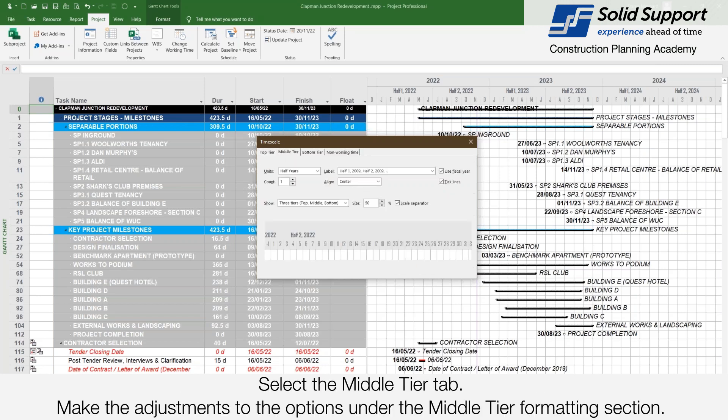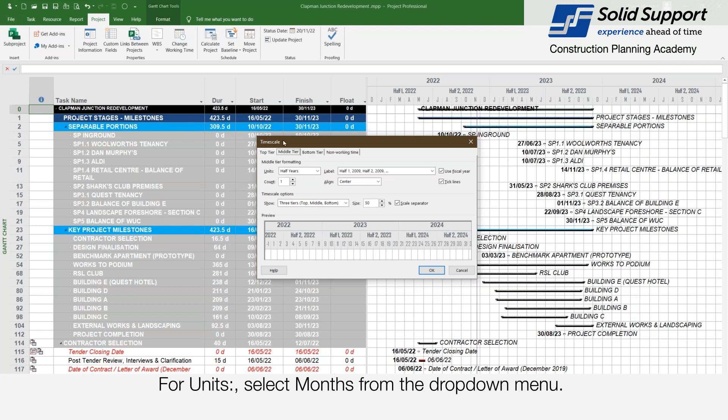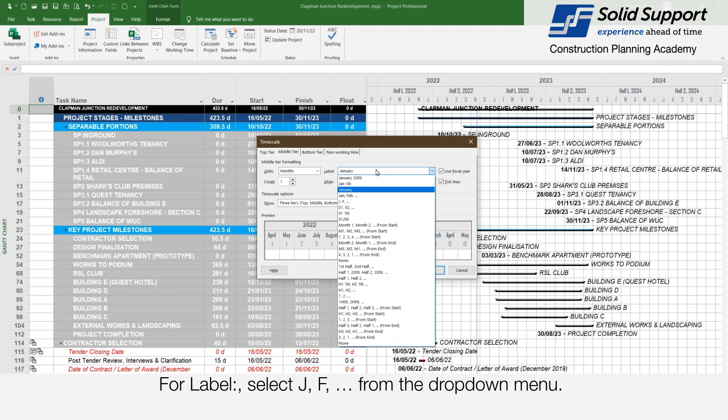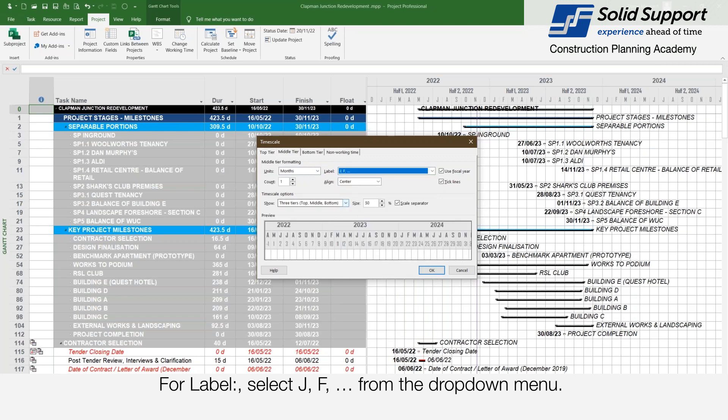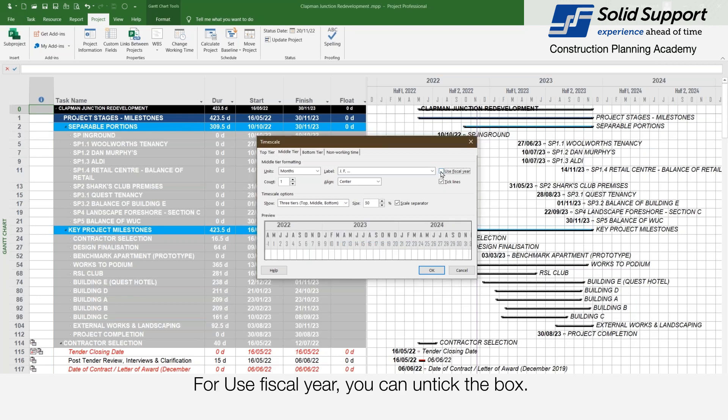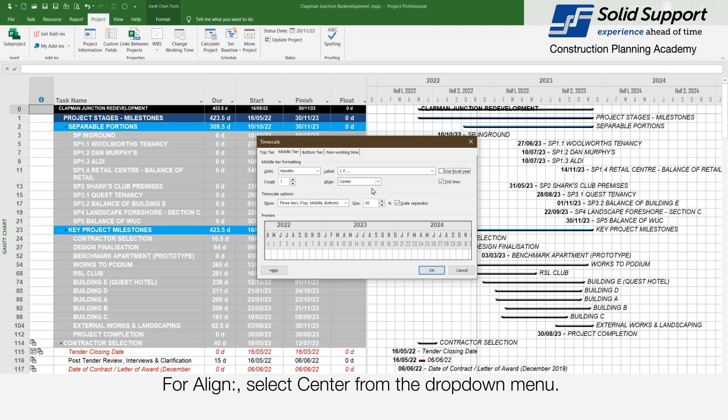Select the middle tier tab. Make adjustments to the options under the middle tier formatting section. For units select months. For label select G, F... from the drop down menu. For use fiscal year you can untick the box. For count enter 1 in the box. For align select center from the drop down menu.